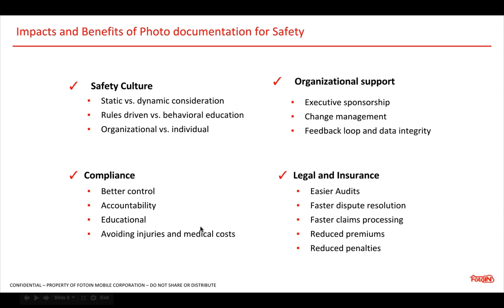Basically, all kinds of downstream impacts from not following, not being compliant to the safety standards of the site. Now, in some instances, that can bring up a change order. The crew was sent home, and now they ask to be paid for showing up on site. If you're in a he said, she said situation, the question is how is that going to get resolved?